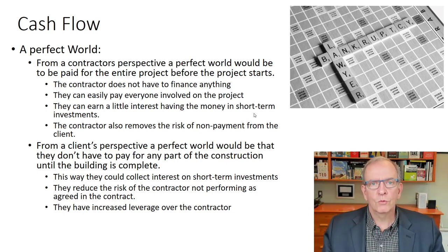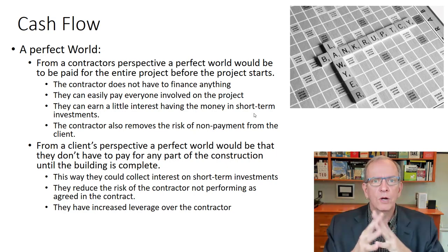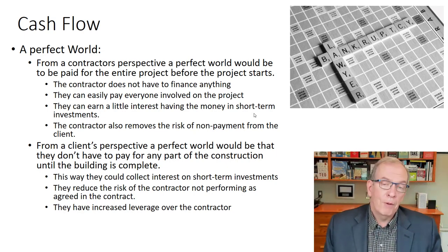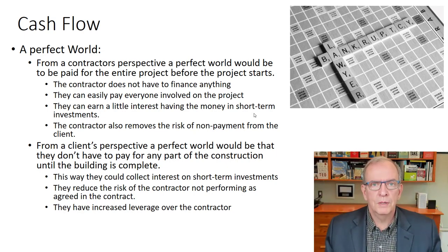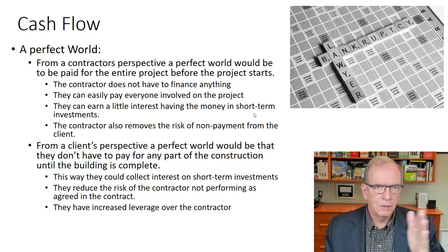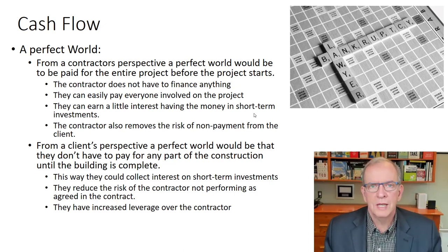Now, the real world is somewhere in the middle between the perfect world for a client and the perfect world for a contractor. Part of that depends on your ability to negotiate, the schedule of values that you've laid out at the beginning, the breakdown of the payments that you expect to get when you hit certain milestones, and also determining what percentage of work is complete of those amounts if you're going to be drawing, say, monthly.